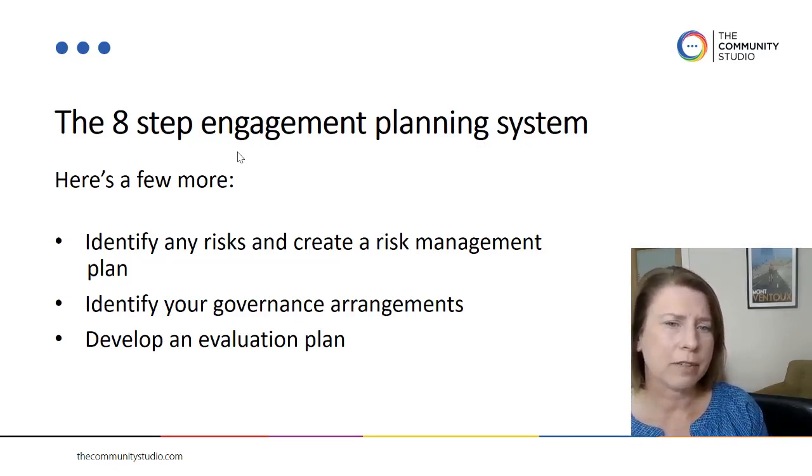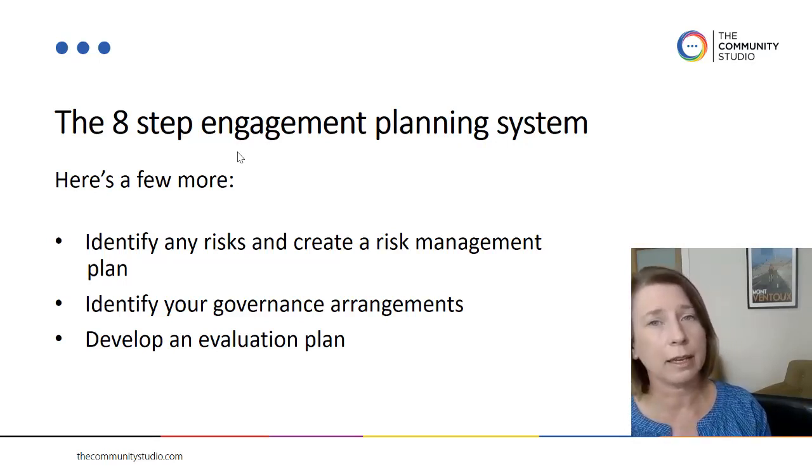And identifying your governance arrangements, especially if you're working in collaborate and empower, governance arrangements are very important to know about. If you have stakeholder groups or working groups or anything like that as part of your engagement plan, knowing exactly what their role is going to be and what their decision-making power is going to be is important.